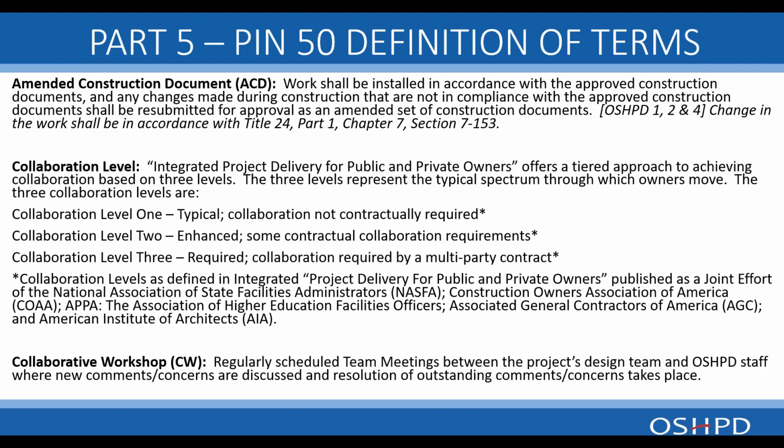Collaborative workshops. These are used basically in the collaborative review and construction reviews. They are regularly scheduled team meetings between the project's team, design team, and OSHPD staff, where new comments, concerns are discussed, and resolution of outstanding comments, concerns takes place.